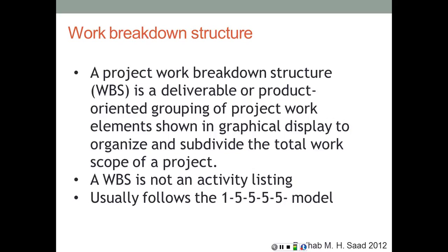So basically what we're saying here is that the work breakdown structure is a graphical translation of the scope of work of the project. It can be used as a planning tool and as a control tool as well, to make sure that we did not skip anything or forget anything in our planning for the project. It is not an activity listing. It stops one step short, or maybe two steps short, of activity listing.